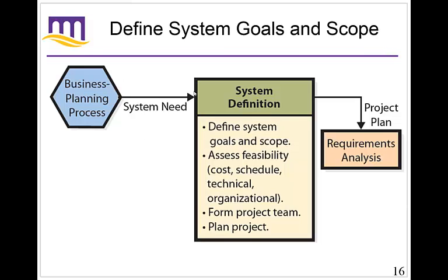But when we define the feasibility, there are basically four main dimensions: cost, schedule, technical feasibility, and organizational feasibility. Organizational can also include things like, is there support from the executive team or the people who are going to be using it? Oftentimes in some organizations, people just don't want to do things, or if they're not required to do it, they won't do it. And this can happen oftentimes, like at the university, right?